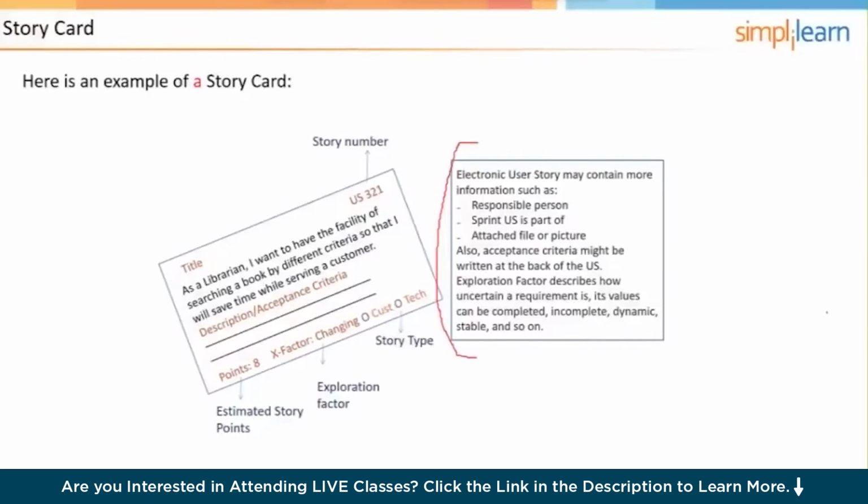Could even include a responsible team member, or depending on how you're doing it, you would break the user story down into tasks, and you might have team members assigned to various tasks. So that's typically what a user story card is like. Sometimes they're cards, sometimes they're sticky notes put up on a Kanban board if you're using Kanban to track the project.